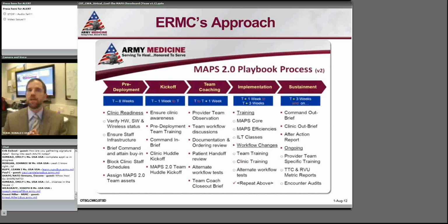That 1 week we spend talking to the teams about what their roles are and making sure those teams are stabilized is everything for us. From there, we have a yin-yang in the final 2 weeks of training and workflow. And then, truth be told, during our 4th week sustainment, our goal is to do nothing. They're back to 20-minute appointments.